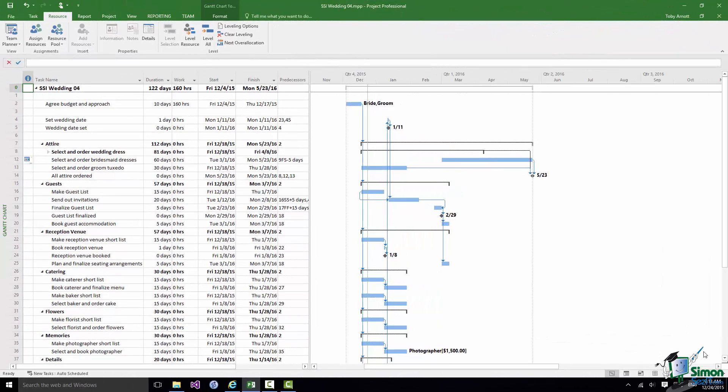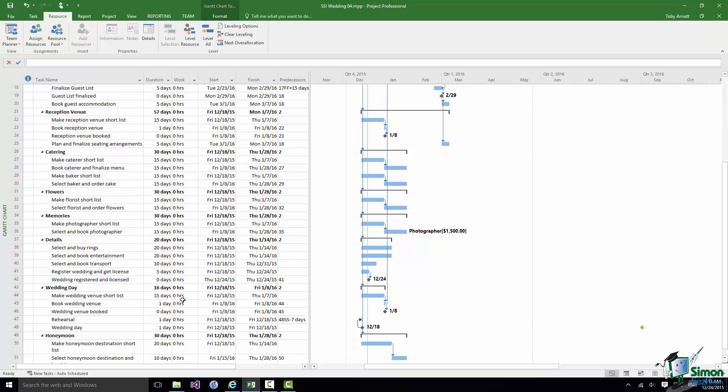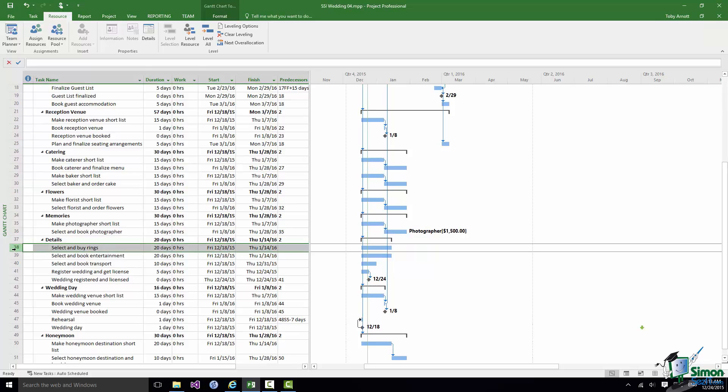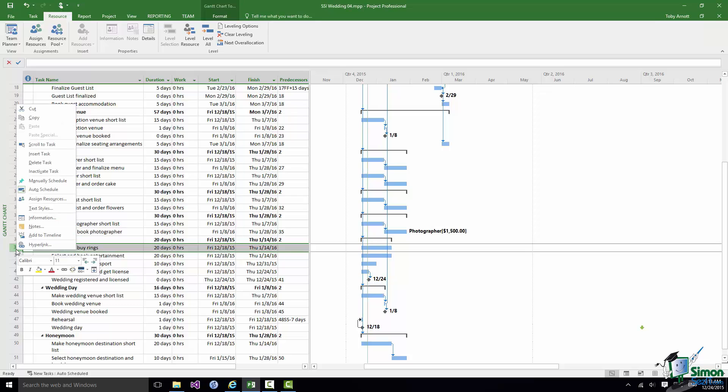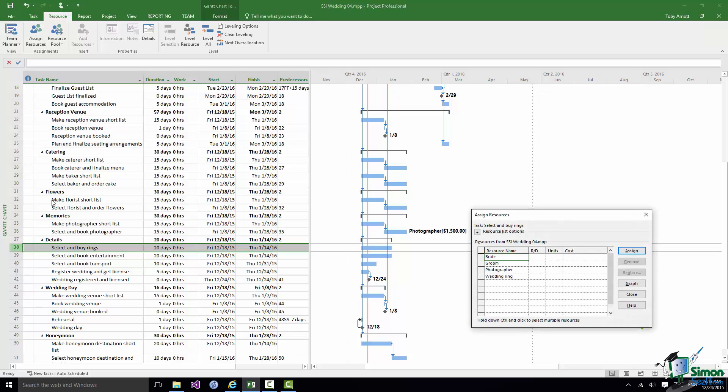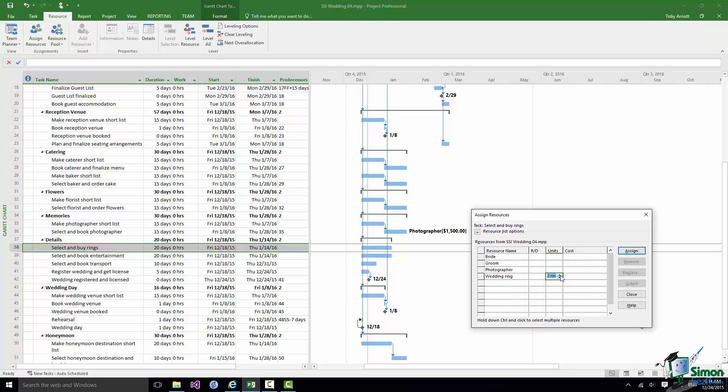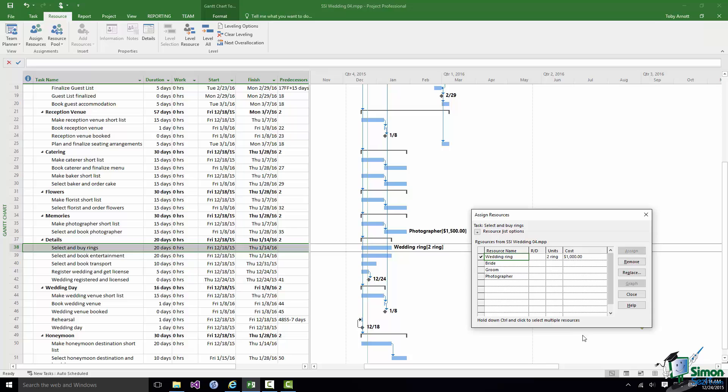The last assignment that I would like to make here is the assignment of the rings. So I'm going to go to Select and Buy Rings and right click. I'm going to use this approach to getting the Assign Resources dialog and on this occasion I'm going to choose Ring and I'm going to actually assign the number of rings because we're actually going to buy two rings. Note how as I use that roller there the units I've specified for rings which is the text that I put in the material column on the resource sheet is shown. You can just about see it there. It's saying two rings. You can just about make it out. You'll see it better in just a moment. Click on Assign and as you can see two rings and it knows that each ring we've allowed $500 for so that's $1,000 for two wedding rings.